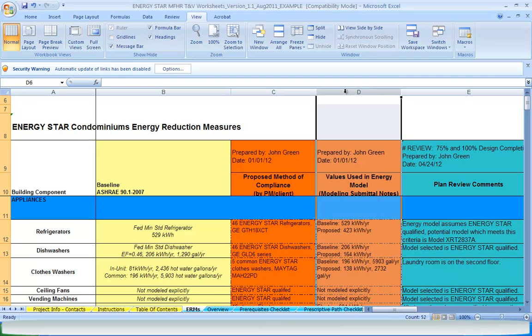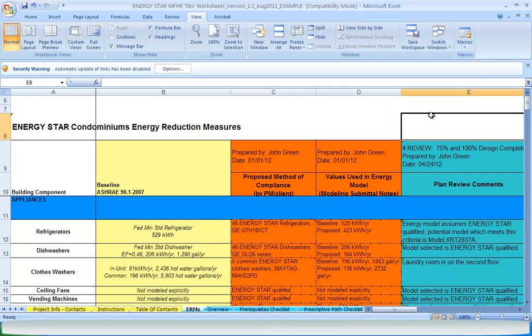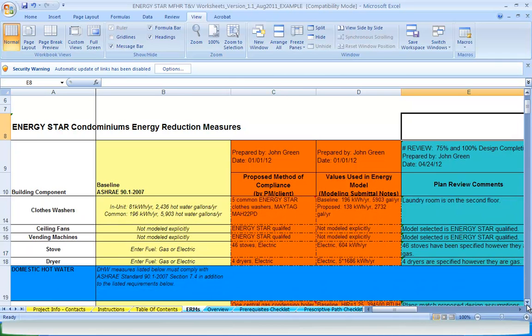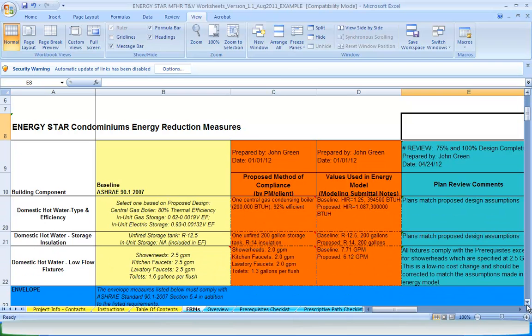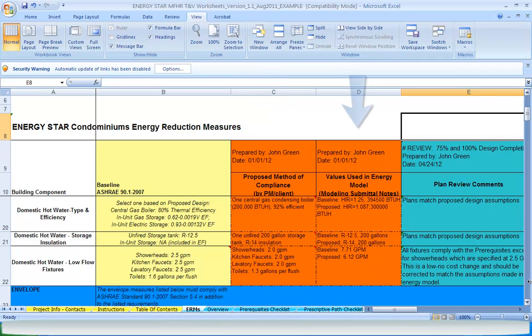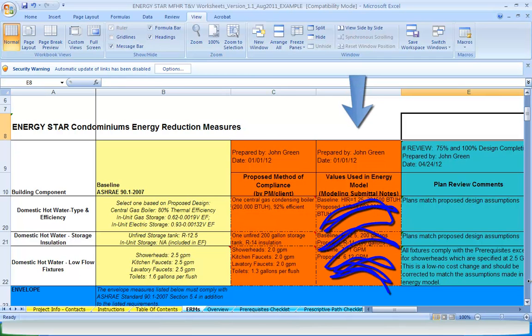The goal of this tab is to centralize all performance data, including recommendations for improvements and feedback on field conditions to confirm the testing and verification requirements have been met. If the project is following the performance path, fill in columns for the proposed method of compliance and values used in energy model, which link to all relevant TNV worksheets. If following the prescriptive path, the proposed method of compliance column shall be filled in according to the requirements of the prescriptive path, and the column for values used in energy model can be ignored.